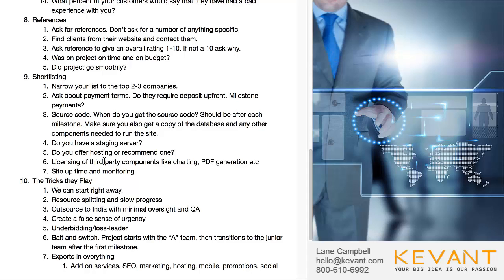You also want to ask how they license third-party components. So maybe your project needs a charting component, or it's going to have some PDF generation, etc. You want to determine how the licensing is set up. You want to make sure that the licensing is in your name if you're paying for it, and that way, if you had to transition this project to another company in the future, you still want to make sure that you actually own the licensing for these components.